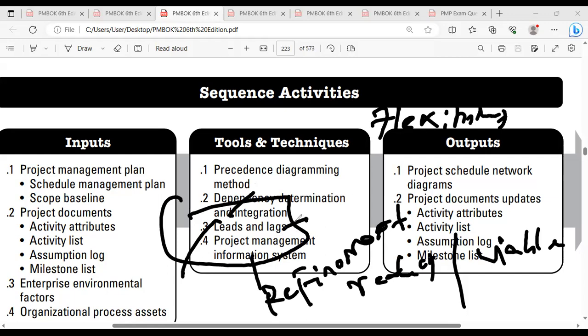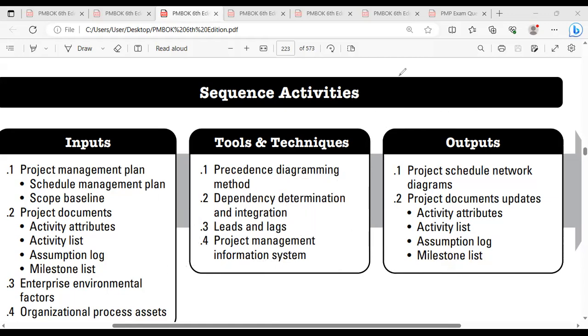And for a lag, once your concrete is poured, to continue the further work you are just waiting for the concrete to get cured. The curing period, which will take 7 to 8 days, and then you will start your work. So this curing period will be a lag period. Is that clear or not, guys? Yes, sir. It's clear. So you need to apply this refinement to get a viable, flexible schedule. Always your schedule should show some flexibility.